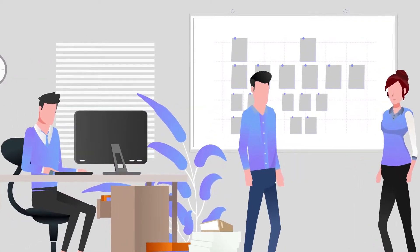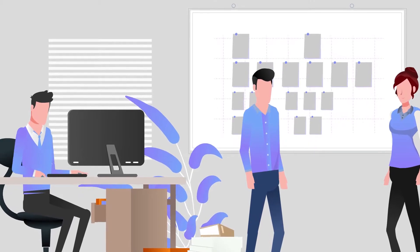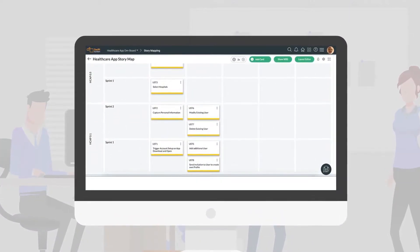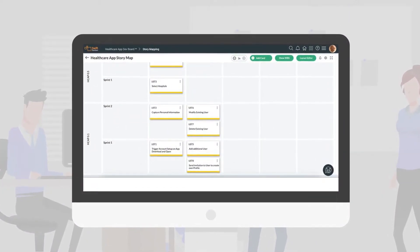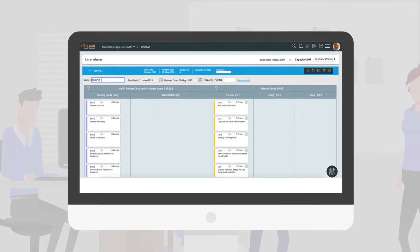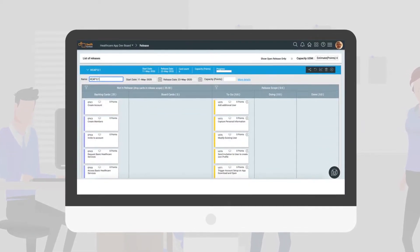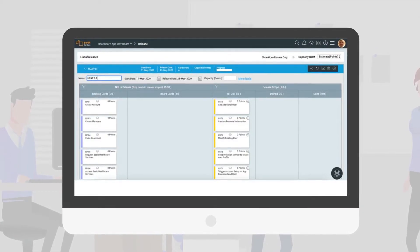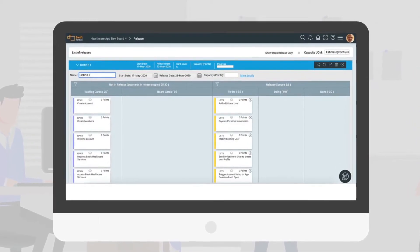Once the story map has been sufficiently developed, specific user stories can be assigned to releases and sprints in order to schedule their development. These stories then automatically appear in the release plan of your product and can be managed on the appropriate board based on their prioritization.